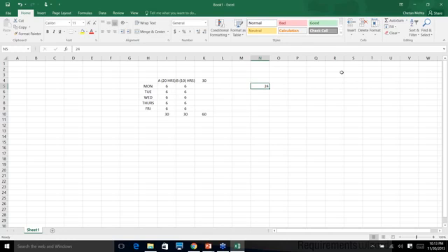So let's suppose in the beginning of the project, I say that one sprint will be 3 weeks. And I'm saying that it will take me roughly 6 sprints to do this project. So 3 weeks each, 18 weeks we'll need to complete this project, correct? Agree?